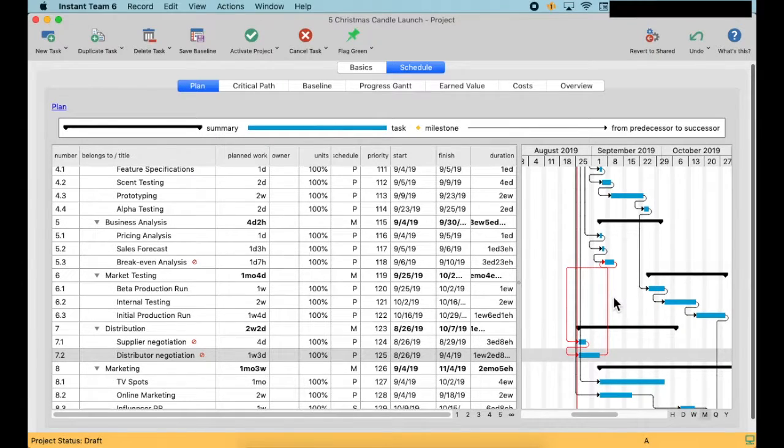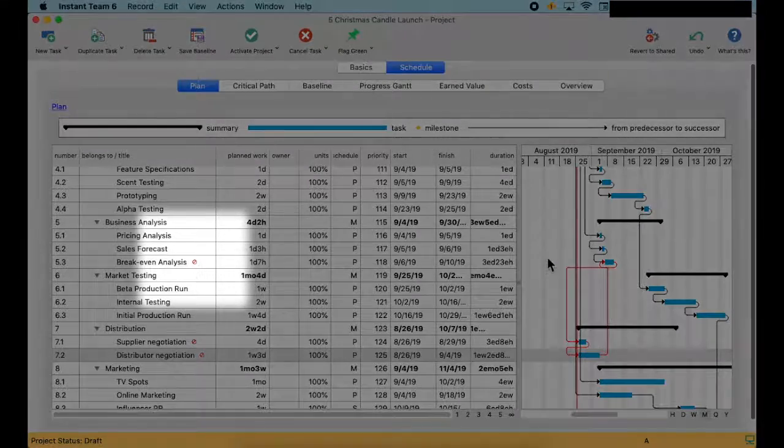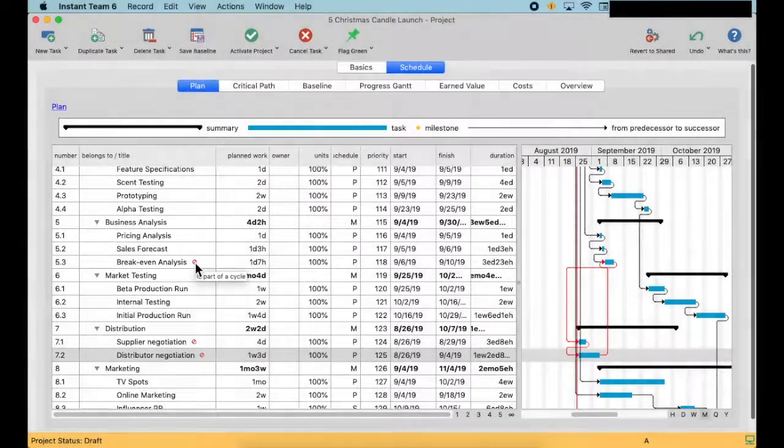When we are scheduling, a conflict can arise. It means that somewhere is a problem. When this happens, a red mark shows up next to the task name. To find out the cause of the conflict, we must hold our mouse cursor over the red icon.